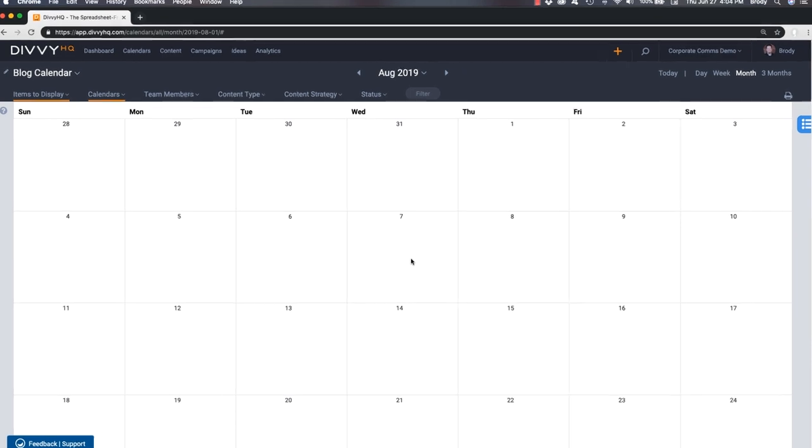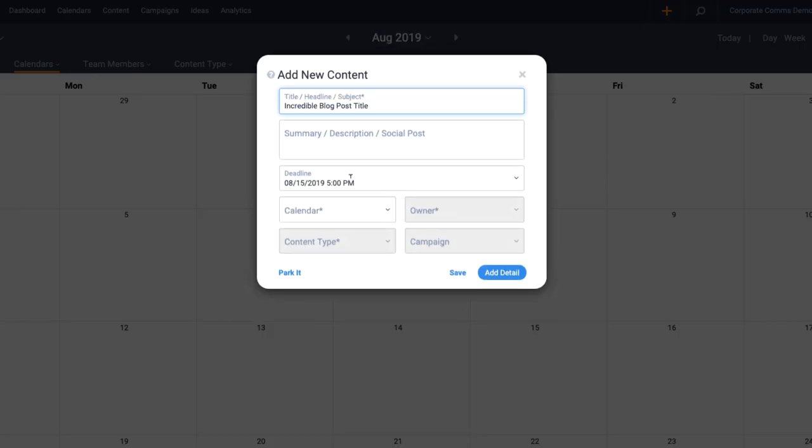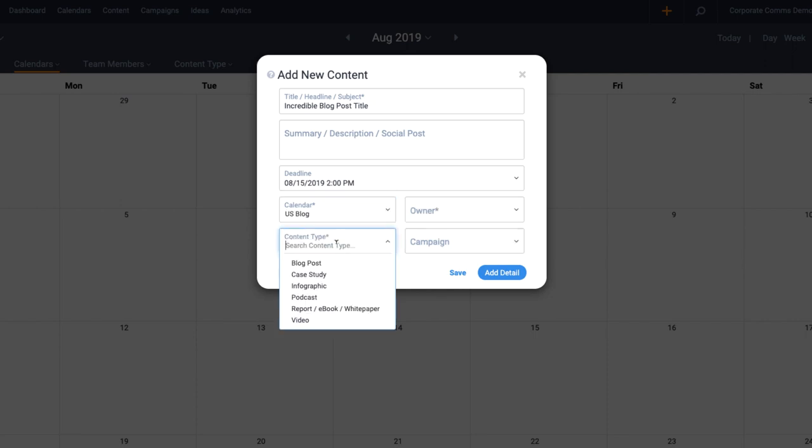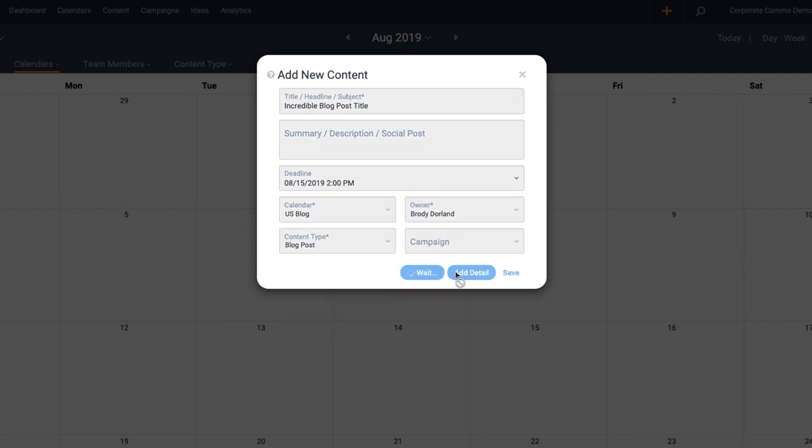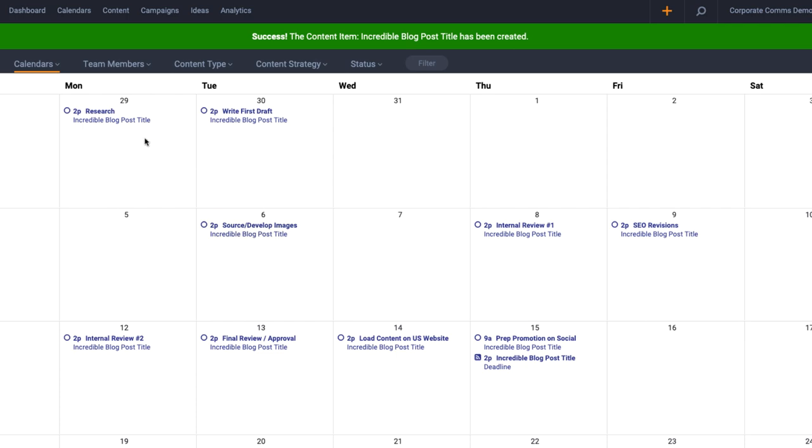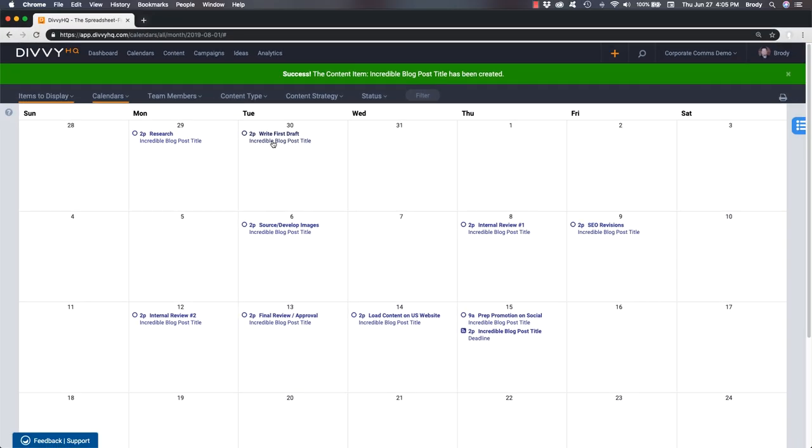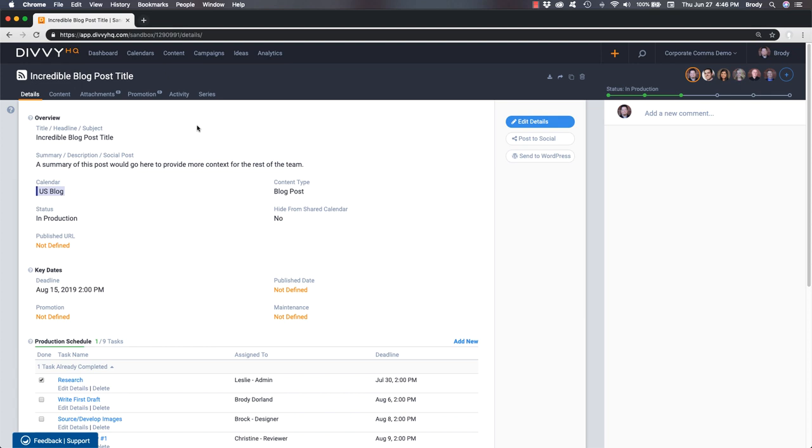With that custom workflow in place, now when I add a new blog post and I associate it to the blog calendar, our production schedule will get created automatically, including calculating all deadlines and notifying your team of their new tasks. Let's head over to the sandbox interface to take a closer look.